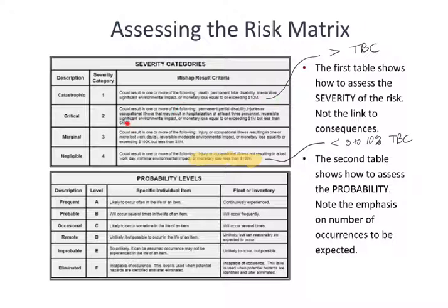You have reversible significant environmental impact. So it's still reversible, but now the cost is going to be significant because this is a big cleanup. And you notice that the financial amount is growing very large, $1 to $10 million. Finally, catastrophic, anything that can result in the loss of life or total disability.